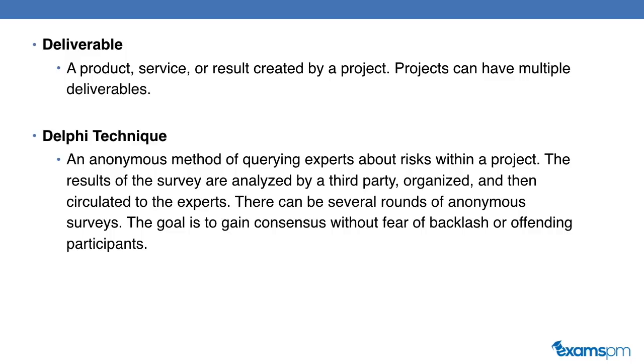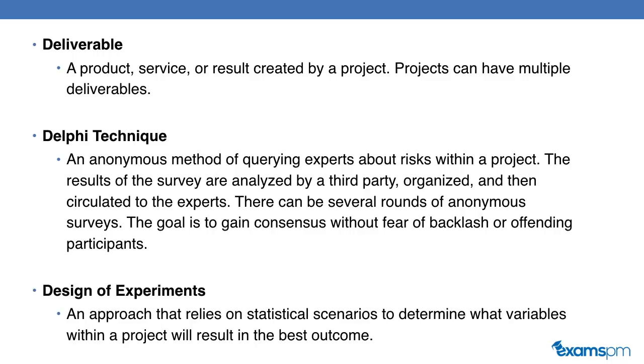The Delphi technique, this is when you will send out surveys to all of your stakeholders and they will respond back anonymously. So no one knows what the other person is saying. And you might have to do several rounds of this in order to achieve consensus on an issue. The benefit of using the Delphi technique is that your stakeholders do not have to fear backlash or offending other participants. They can give you their real responses. The con of using this technique is that it could take a very long time. Design of experiments is an approach that relies on statistical scenarios to determine what variables within a project will achieve the best outcome.